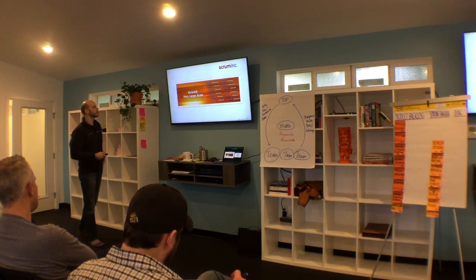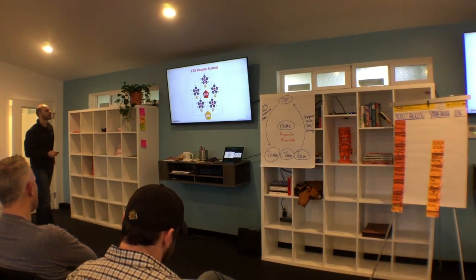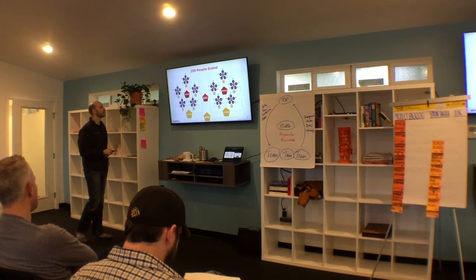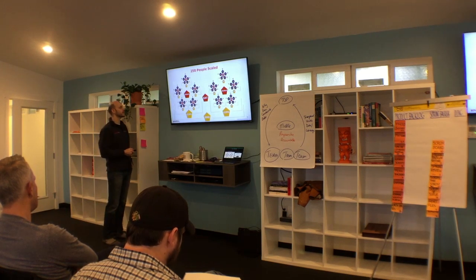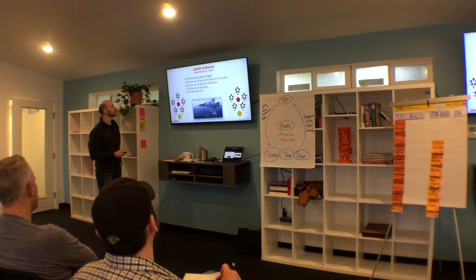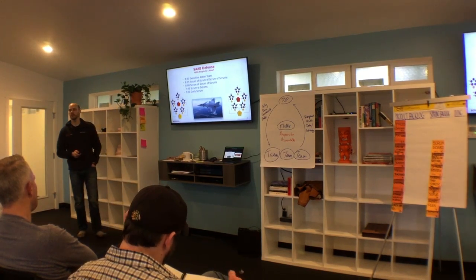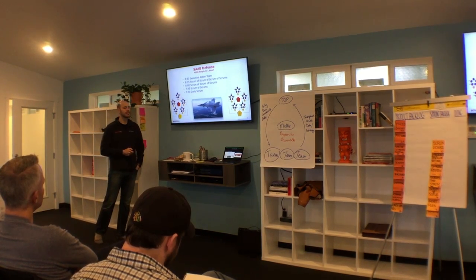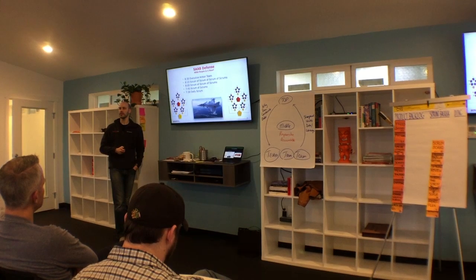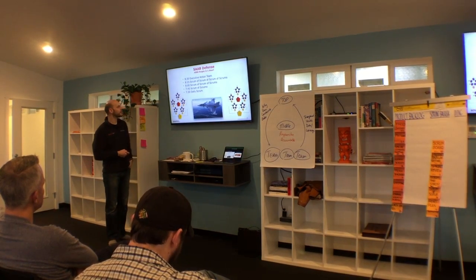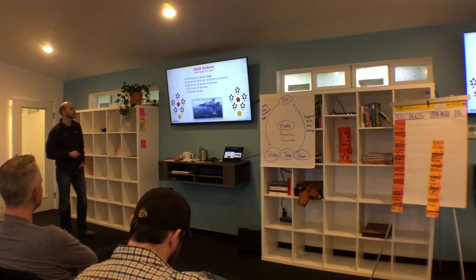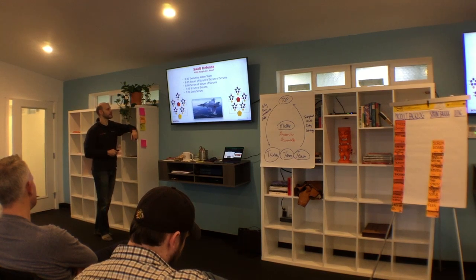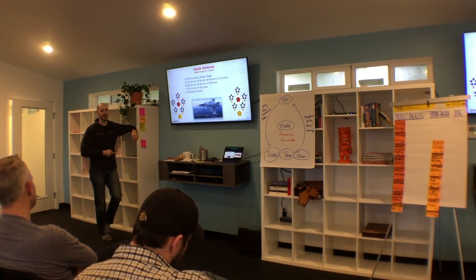So what does it all look like working together? Here's Scrum at very large scale. 125 people scaled. We have the product owners and the Scrum Masters meeting. 250 people scaled. We have the product owners and the Scrum Masters meeting. Sob Defense, 4,096 people scaled in 1 hour. Here's what they say they do every day. At 7:30, the Scrum Masters host the first daily Scrum. At 7:45, 1 out of 5 of each of those people go to Scrum of Scrums. At 8 o'clock, 1 out of 5 of those people go to Scrum of Scrums. At 8:15, Scrum of Scrums.